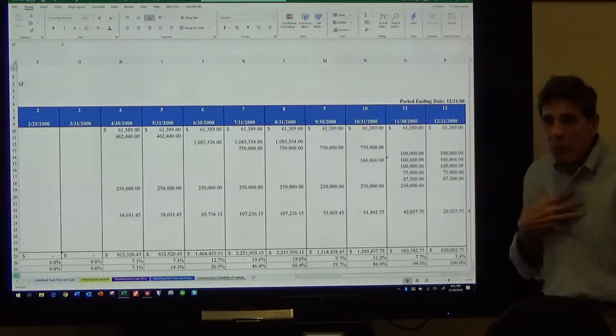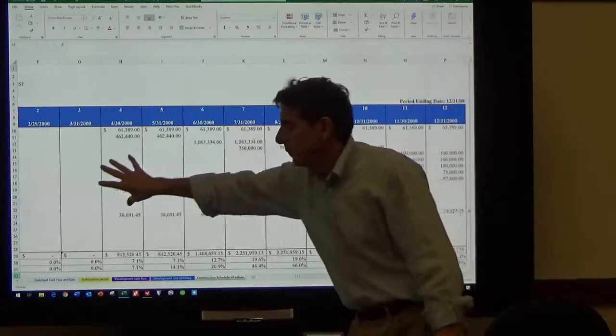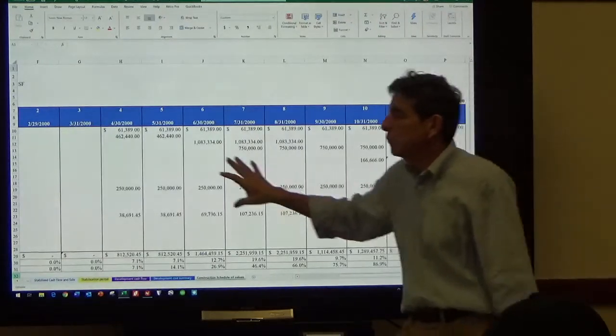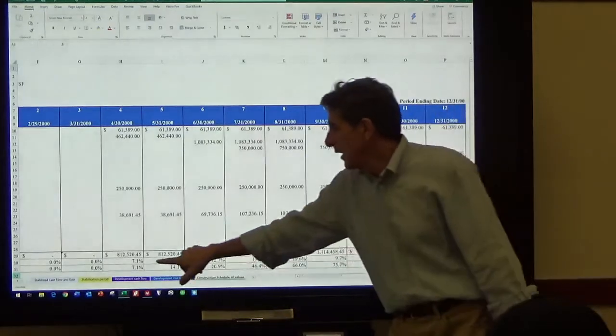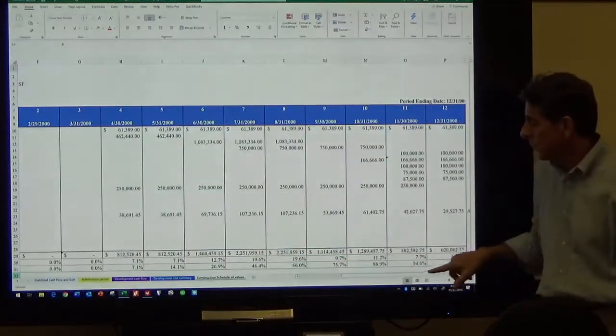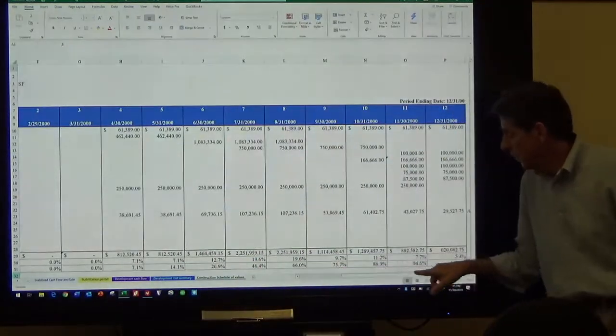So, hopefully, you've got enough experience, but they're going to help you through this. And they're going to tell you, you know what, this is how we see this budget playing out over a 9-month period. And you can then calculate your curve. You can figure out how much each month, and you can figure out how much cumulatively.